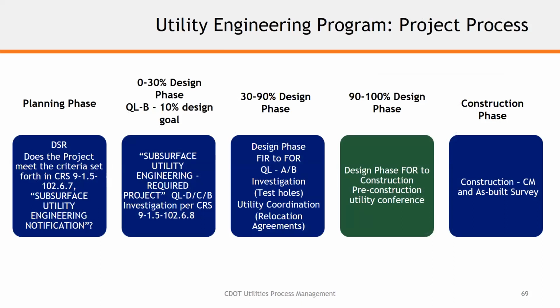Determine what's been relocated and what's left to relocate, just like you just spoke about, Joe, when you have a project that's relocating early somewhat, and then there's still things to move during construction, so keeping tabs on all of that is extremely important with the construction management type of scenario. And then clearly define and coordinate roles between the utility company, utility coordination team, and the construction management team. Communication is one of the biggest hurdles and breakdowns we have in our system with relocating utilities. And Joe, you showed a great example of how communication broke down, and then it created a problem during the utility installation, and they had to move it again. So there's that effort that we need to really monitor to try and help with those situations.